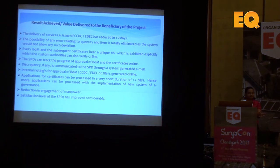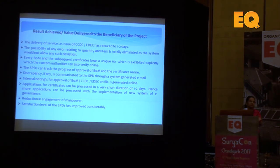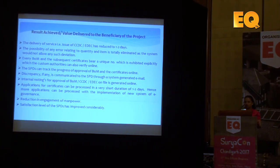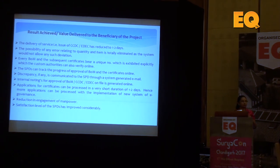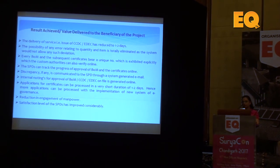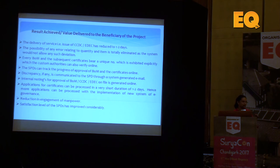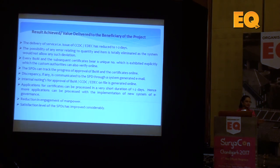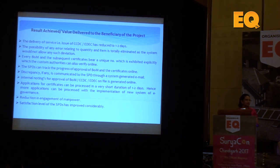The results are clear: the process is now online and pain-free, time is very much minimised, and you get approximately 10 percent of your total project cost reduced. With the new online system, BOM and custom duty exemption are much easier — you no longer need to go again and again to MNRE to justify yourself. The scrutiny of the BOM is done by an MNRE-approved chartered engineer, so the design responsibility is shared with a ministry-approved person who authorises all the design engineering, cable calculations and other things.